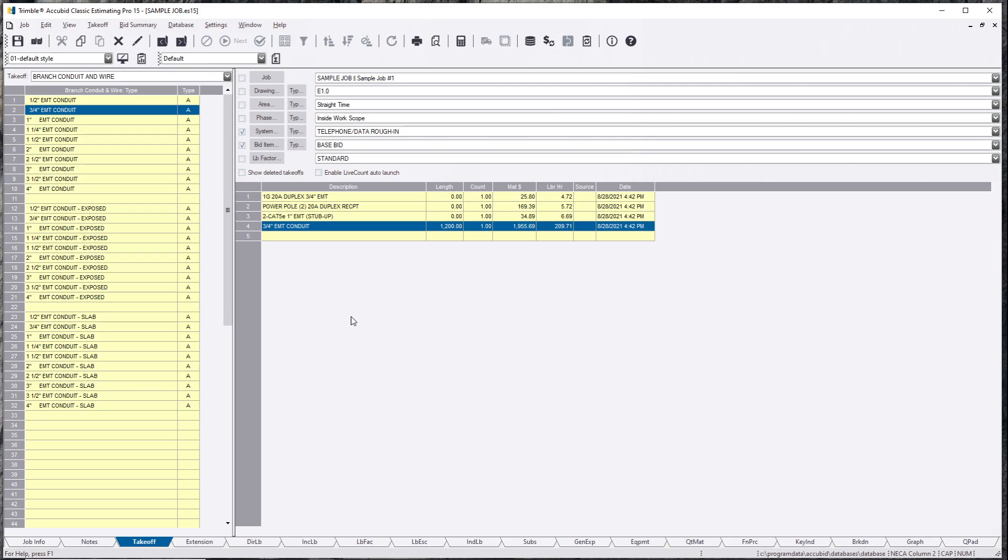Yeah, I stress this enough. This is the way to go. There are different ways to labor factor things, but labor factoring, just impact the stuff that you believe it's going to take a little bit more time to do. Over time, track what you're doing so you can see that on the next one. This is great when you're doing live count because you can open up a drawing and automatically it'll open up and you can look at the whole floor plan.